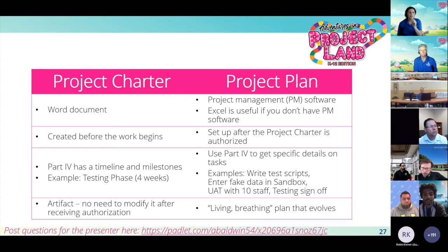Your project plan is set up after your charter is authorized, and it's what you use to manage the day-to-day work and add those new scope items or add those new risks as they come in. Your project charter has the timeline and milestones that you set up, but really you're using that to then build out your project plan and add all that depth and detail. So you might have said you needed testing, and then in the project plan you're saying, okay, I need these specific test scripts written. Your charter is really an artifact. You don't really need to go back and edit it further.